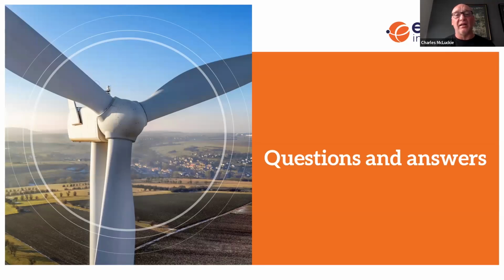So consider the practicalities of what happens if a fault occurs, because in effect you're tasked out. What we don't want is the turbines being tasked in and out constantly. It's probably down to the nature of the work and the durations, but it may be best that you try wherever possible to task one turbine at a time. I understand that it creates a bit more administration work, but that should be considered in the overall assessment of the suitability of the rules.